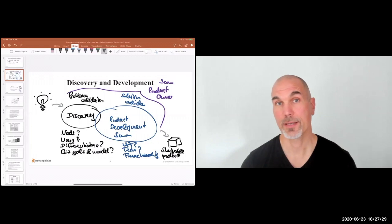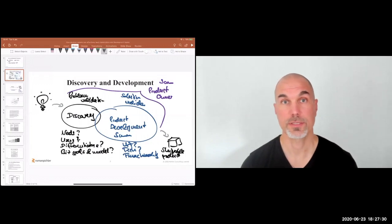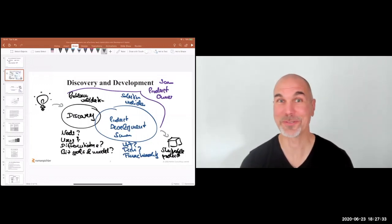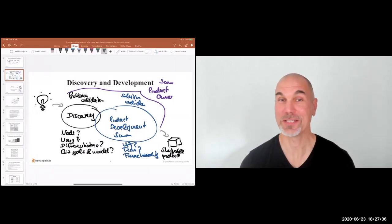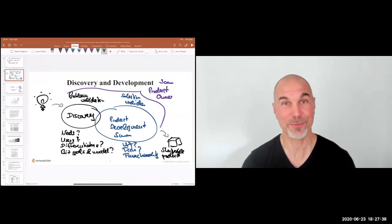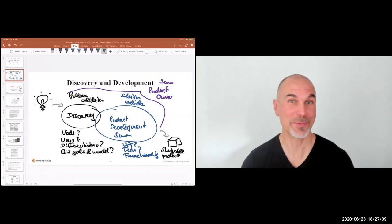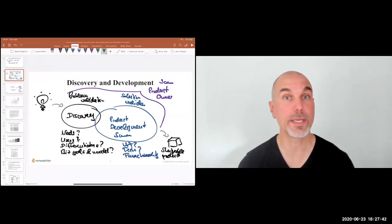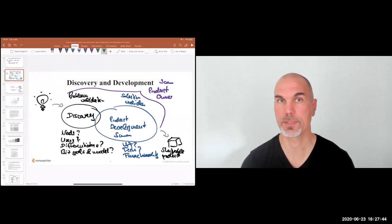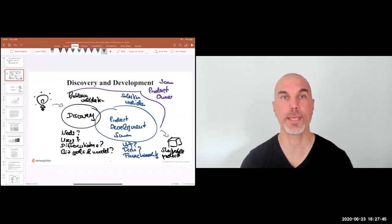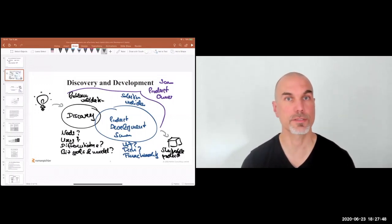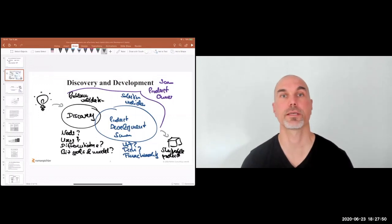But it's a bit like asking how long is a piece of string. Whenever we don't know how long something takes, it can be helpful to use time-boxing and say: let's time-box this to two weeks or four weeks, but let's have weekly meetings to see how the discovery and validation work is progressing.